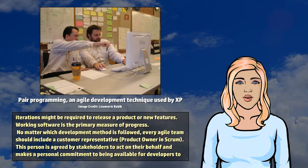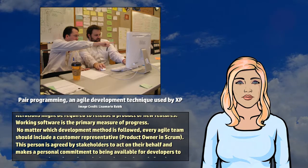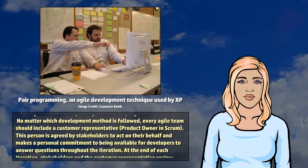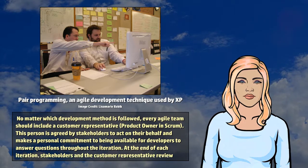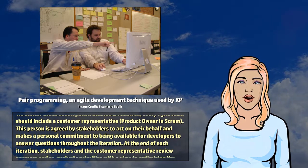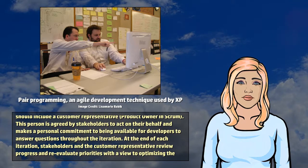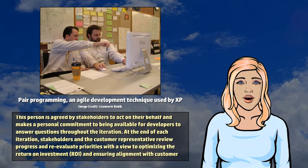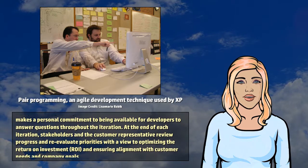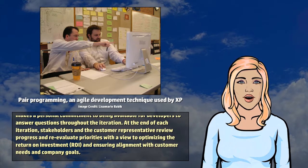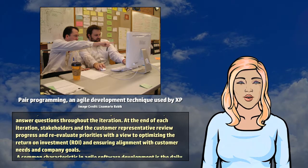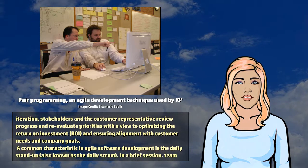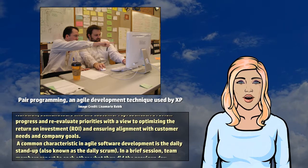No matter which development method is followed, every Agile team should include a customer representative — product owner in Scrum. This person is agreed by stakeholders to act on their behalf and makes a personal commitment to being available for developers to answer questions throughout the iteration. At the end of each iteration, stakeholders and the customer representative review progress and reevaluate priorities with a view to optimizing the return on investment (ROI) and ensuring alignment with customer needs and company goals.